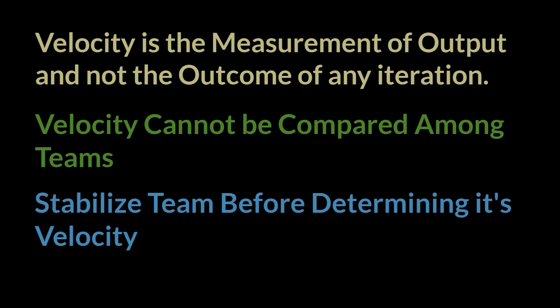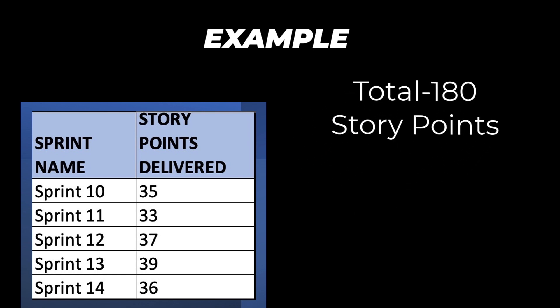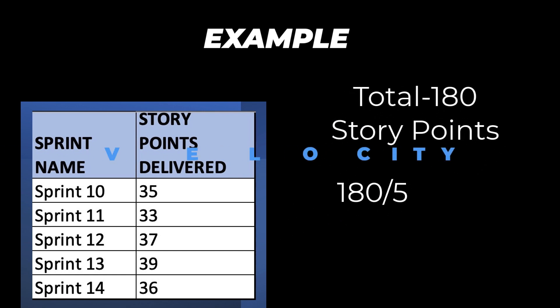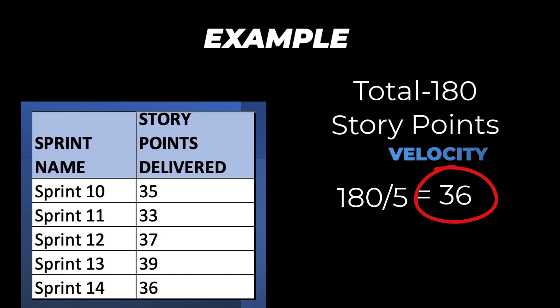Now we know something about velocity — let's take an example and see how to calculate it. Here we have Team A in their 14th sprint, working at a sustainable pace from the past few sprints. They have been estimating in story points and have data of how many story points were delivered from sprint 10 through sprint 14. To calculate velocity, the team adds the story points for these five sprints and divides by 5 to get the average velocity. In this case, the velocity comes out to 36.